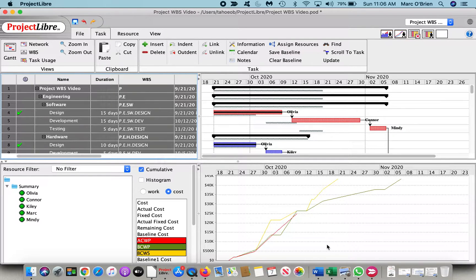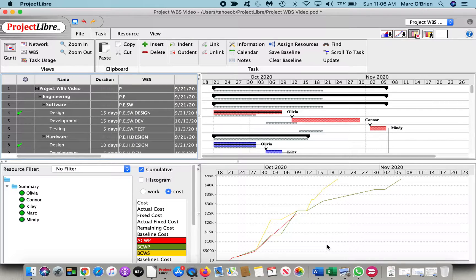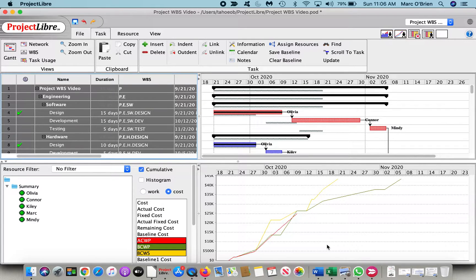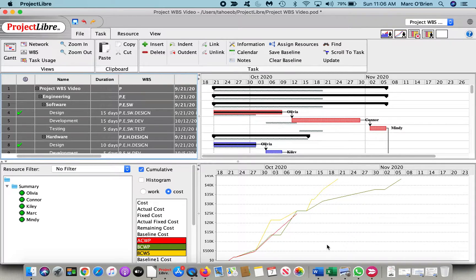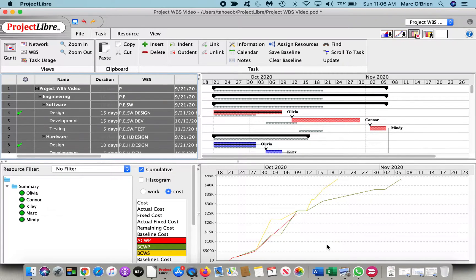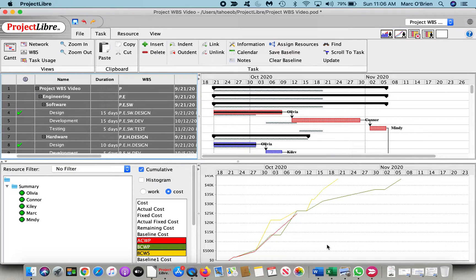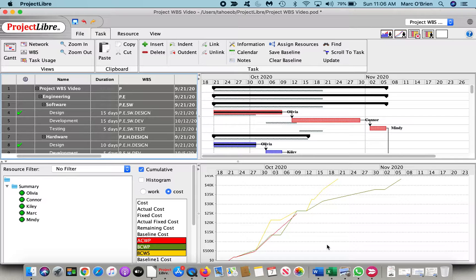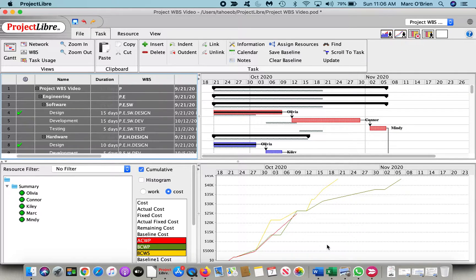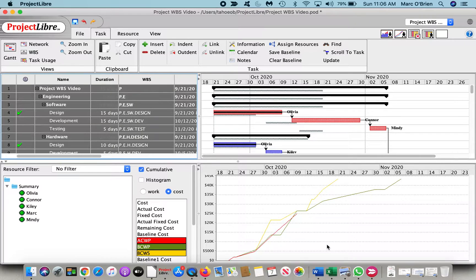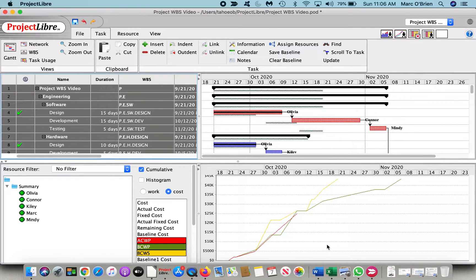There are two key components. One is baselining, so that we have a snapshot, or in this digital age, let's use a throwback and say it's a Polaroid of our plan, schedule, and cost based on that scope at the time. The other relates to our perspective for analysis, similar to the Wall Street example, on what date this is analyzing, similar to the quarter close for a company, but this is for your project. It is often not used properly, and it is the status date.